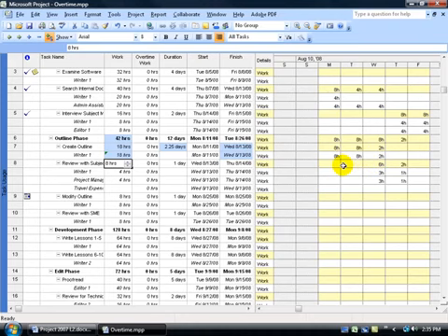So to make that happen and to assign these 2 hours as overtime, we want to come over here in the overtime column and increase that by 2 hours, click off in a blank area and notice the changes. First, the highlighted changes here. So instead of the duration being 2 1/4 days, it's now down to 2 days. And then over here in the grid, notice that instead of 2 hours on Wednesday, it's been pulled back into Tuesday, where he's working 8 hours on Monday and an extra 2 hours on Tuesday.